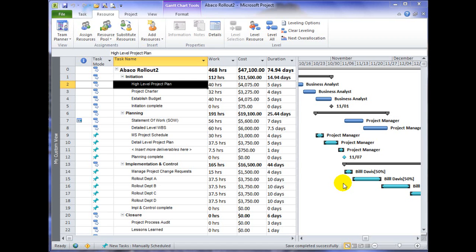It is the amount of work estimated multiplied times the hourly rate of that work resource that determines the cost of doing the work.